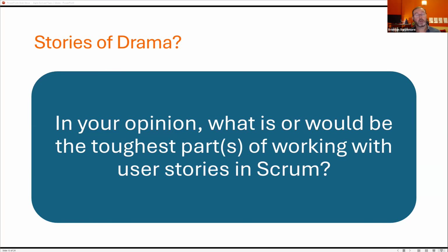The product owner goes back to the customer and says, see these user stories that we thought was going to be 1 week's work? Guess what? It's 2 weeks' work. Do you still want them? And if the answer is yes, we still want them. Well, do you still want your deadline? Is your budget fixed? Yes, the budget's still fixed. Well, what else do you want to cut out then? What are you prepared to cut out if you still want this that's now going to take longer?